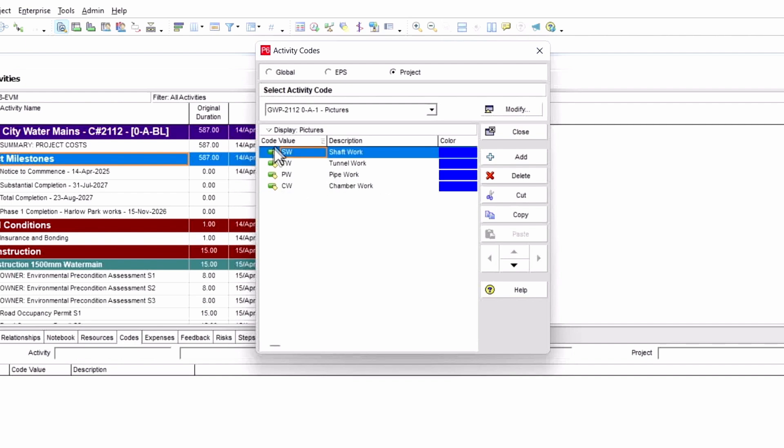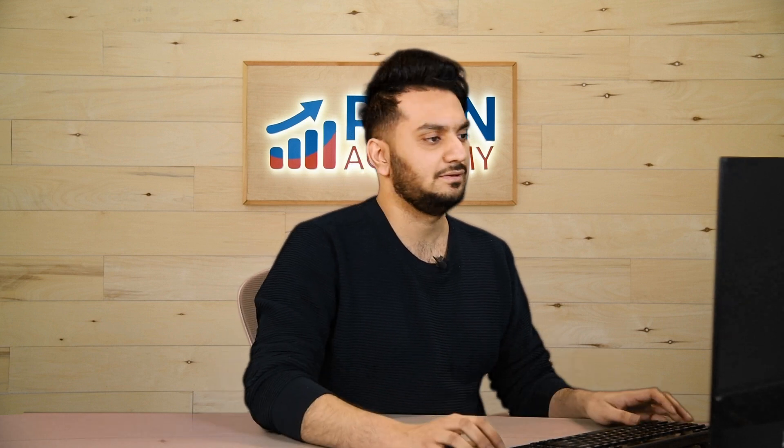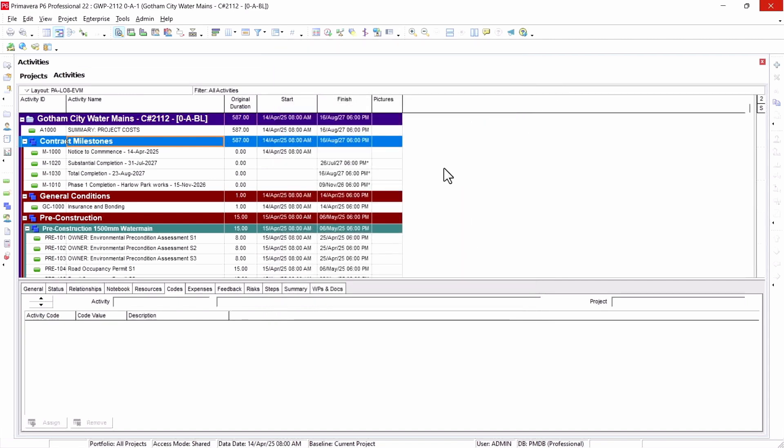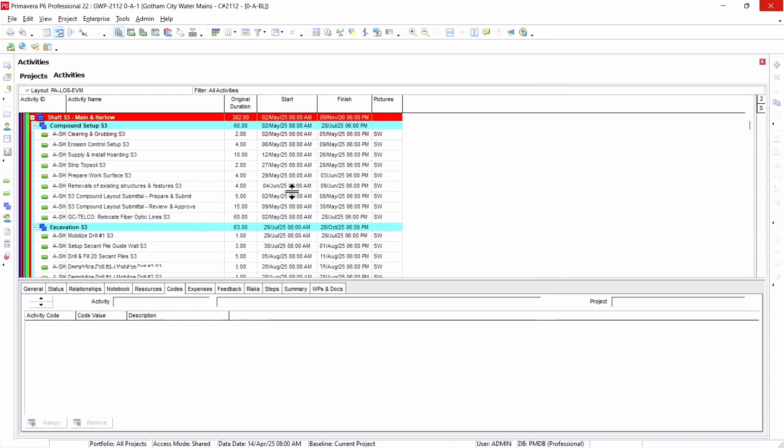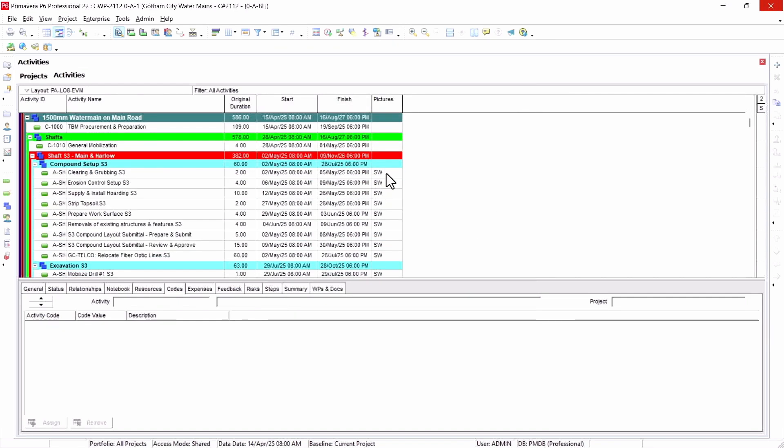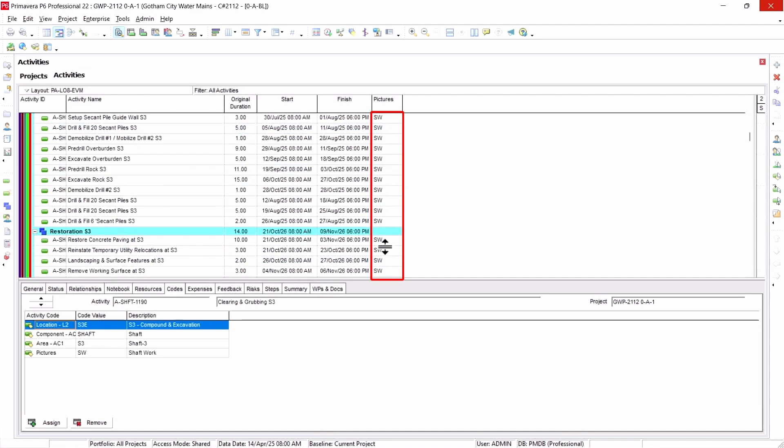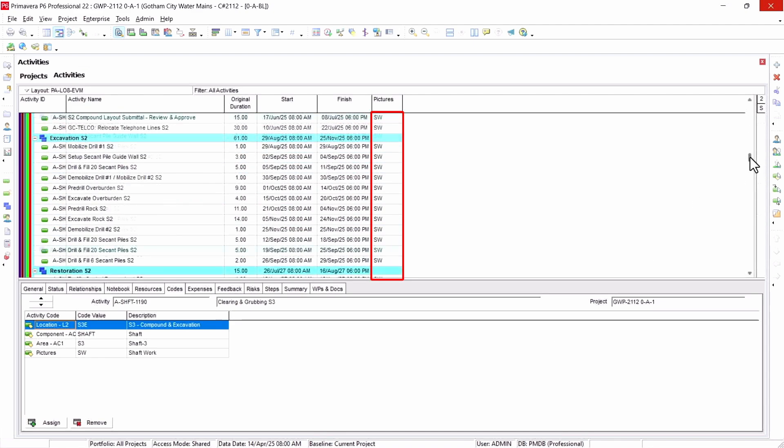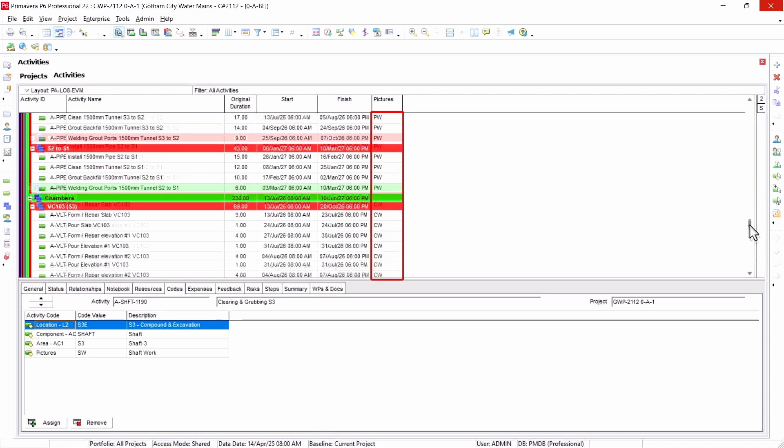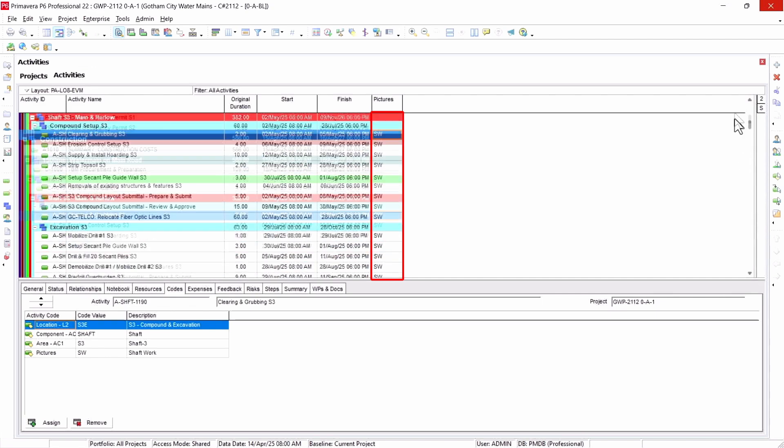This code value is really important, so whatever code value you give here, you have to give the similar code value to your pictures, which I'll show you in a bit. Once you do that, you need to assign it to the relevant activity. For those codes, like for the shaft work, I have assigned here the activity code, and so on for each activity.